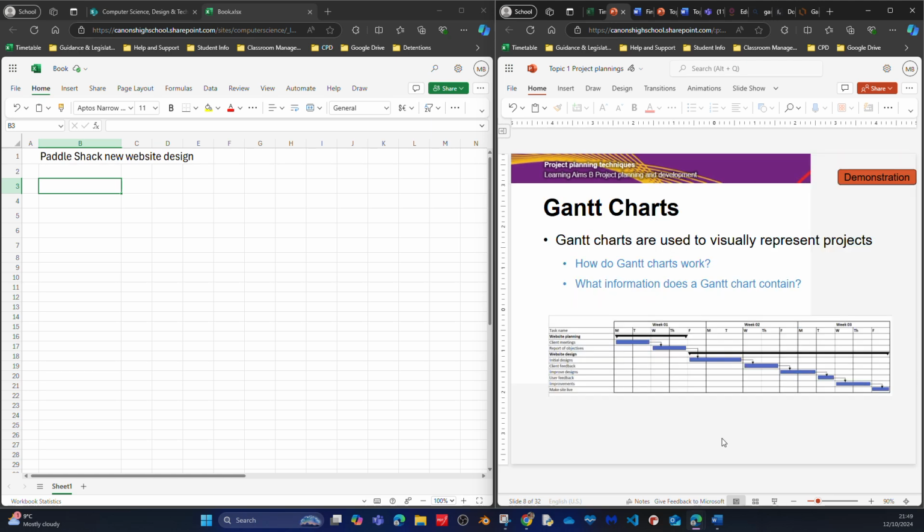In this case, you have to estimate the tasks. You break down the project into tasks, estimate each task, and then sum all the task durations, and then you can tell the client, oh, I estimate this project would take 2 or 3 weeks, okay? And so on.